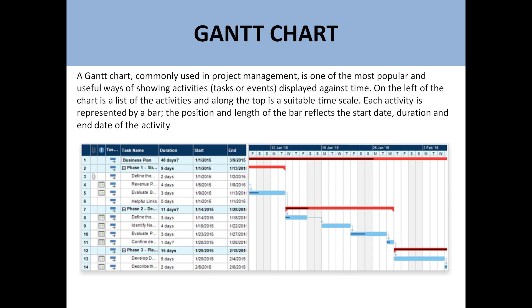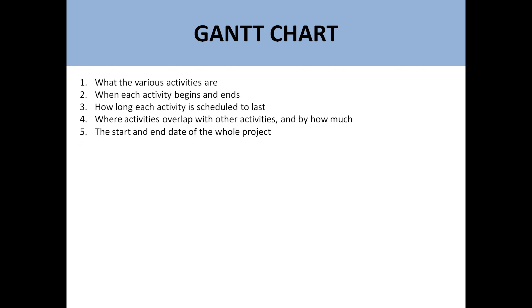It is a very simple and famous way to represent tasks in a Gantt chart, so that we can have an idea of which dates the tasks are starting and on which date they are finishing. Basically, Gantt charts tell you about the various activities in a project, when each activity is starting and when it is going to finish, how long each activity is scheduled to last, where activities overlap with other activities and by how much, and the starting and ending date of the whole project.